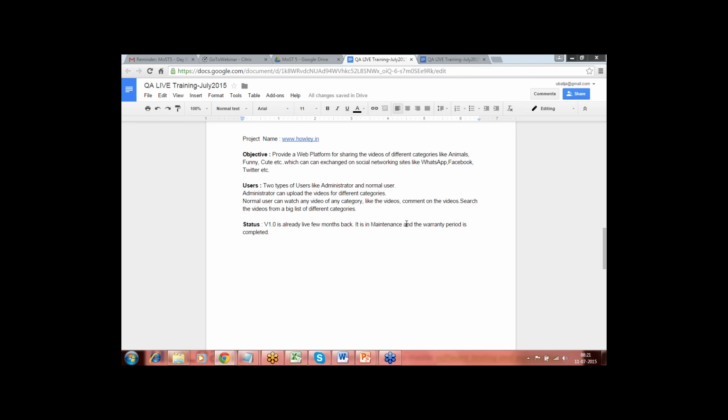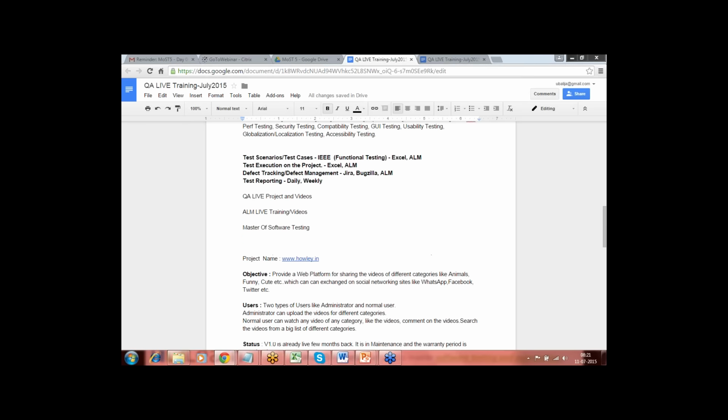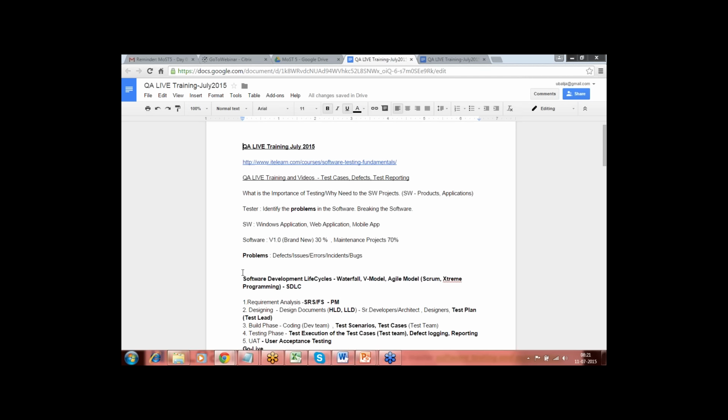From now onwards, any change that comes, we will be charging for that particular change, and it will go through all the different phases that I explained in the last class, yesterday's session. It will go through requirement analysis, where we properly understand what the customer is asking for in the new change. It will go through high level and low level design by the designing or architecting team. It will go through the coding phase where the developers write the code and the test team writes the test cases.